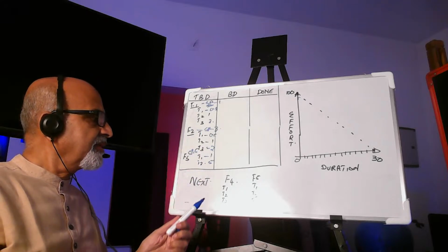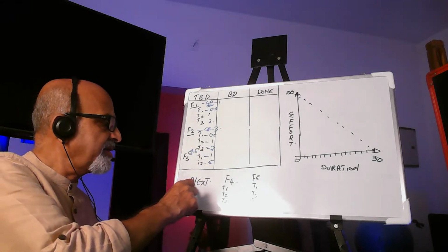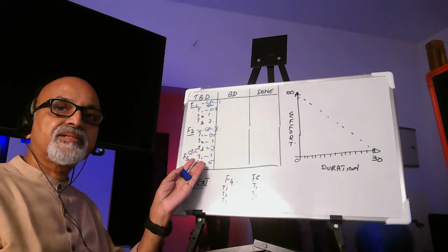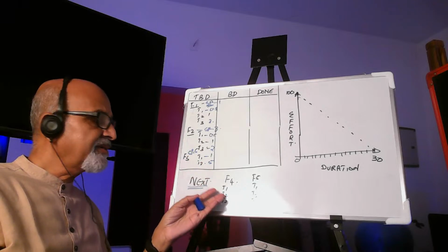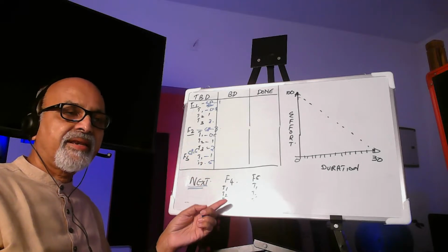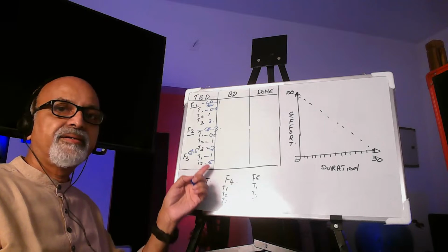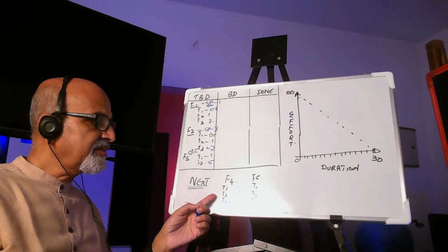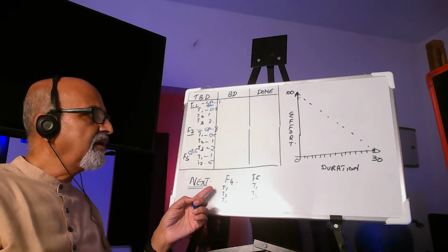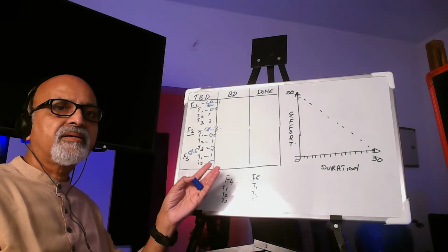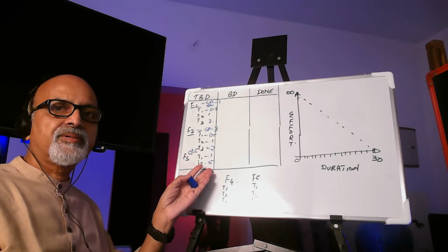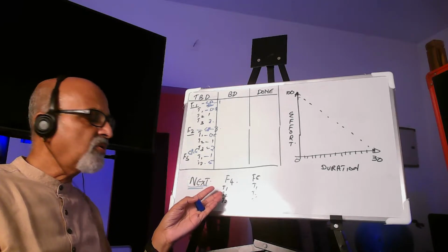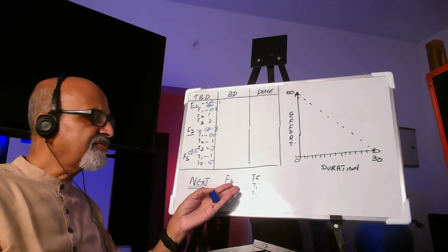Then sometimes we give some additional features. That means in case you complete these features ahead of schedule, then you can try something from the next. This is not mandatory. In a 30-day sprint, if you complete all these things in 25 days, then we can always go ahead and try to do feature 4 as well.